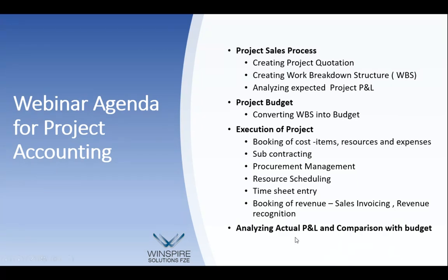Once that is done, we can have procurement management from within the project, in the sense that you can raise a requisition for an item from within the project file, within the project module, and a purchase requisition goes and a purchase is made. Throughout, the project ID is maintained, so that when the purchased item is expensed or booked to the project, it is automatically booked into the project cost.